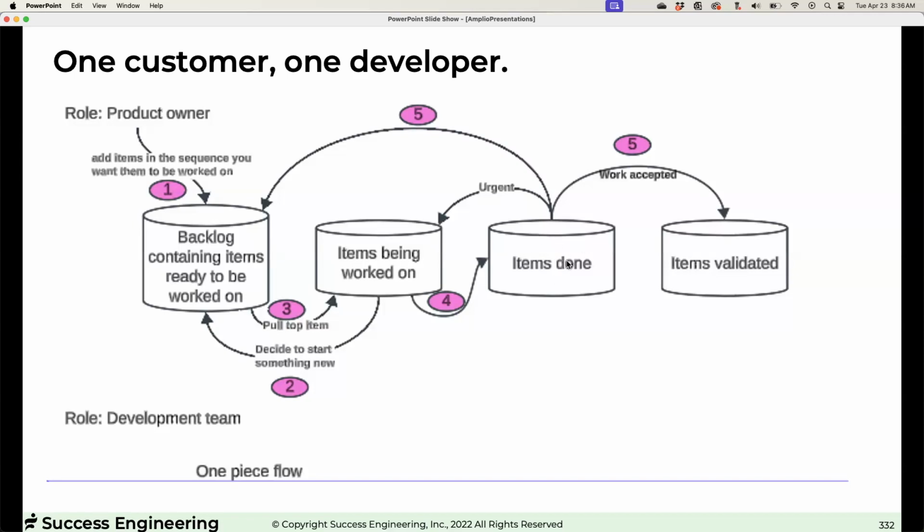And then I look whenever I want to look. See, I'm doing this in a non-synchronized way. I'll look what's here and I'll say, oh, I like that. And I put it in the items. We had 4 PowerPoint files. I would move it into here. Now, if I didn't like it and I really need it, I'd put it back in this file and I'd mark it as urgent, and then they would start working on that. Or I might just mark it as expedited, like you don't have to stop what you're doing, but have this be the next thing. Or I might just decide I'll just put it back on the backlog. It was easy. I mean, I wrote up something, took me about a half hour to an hour. It's just basic Agile, right? And it's just basic Agile.